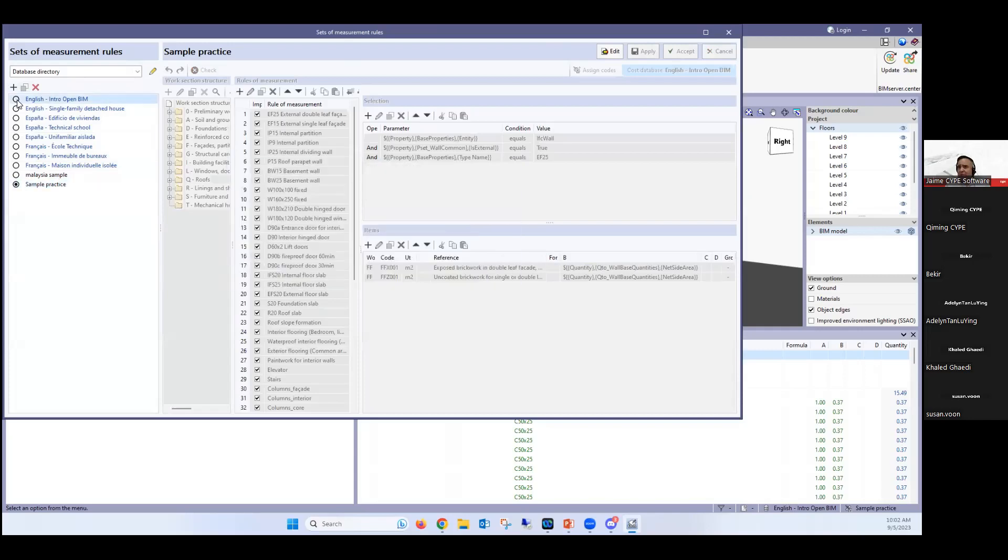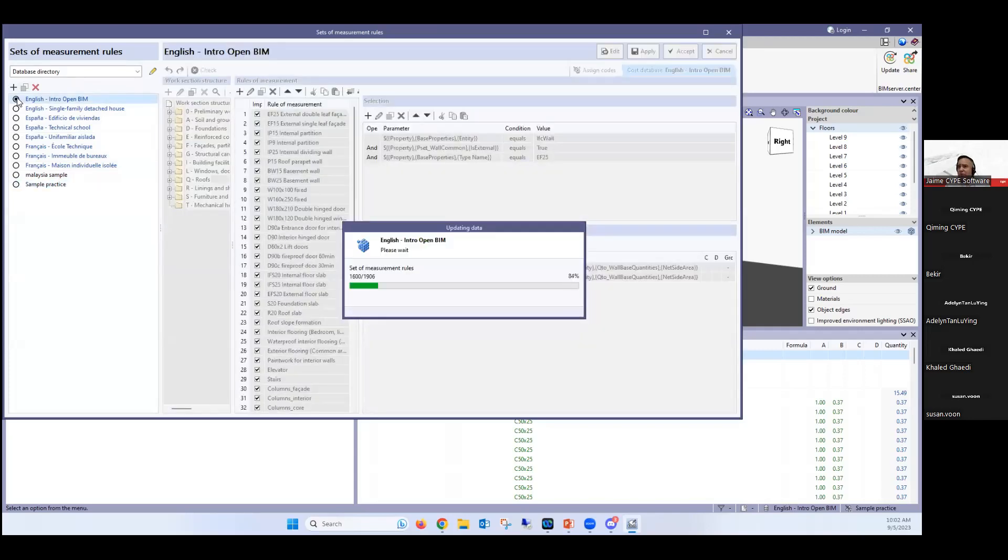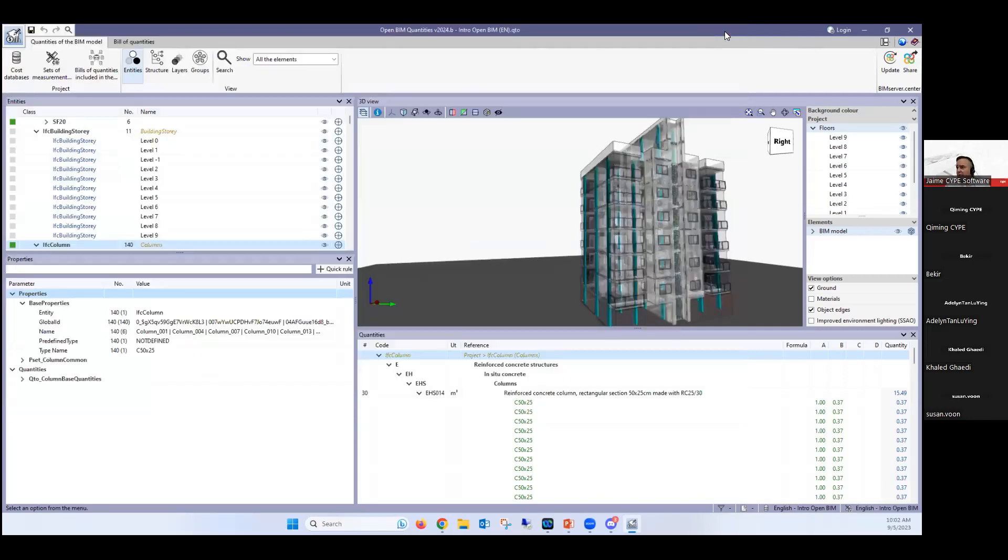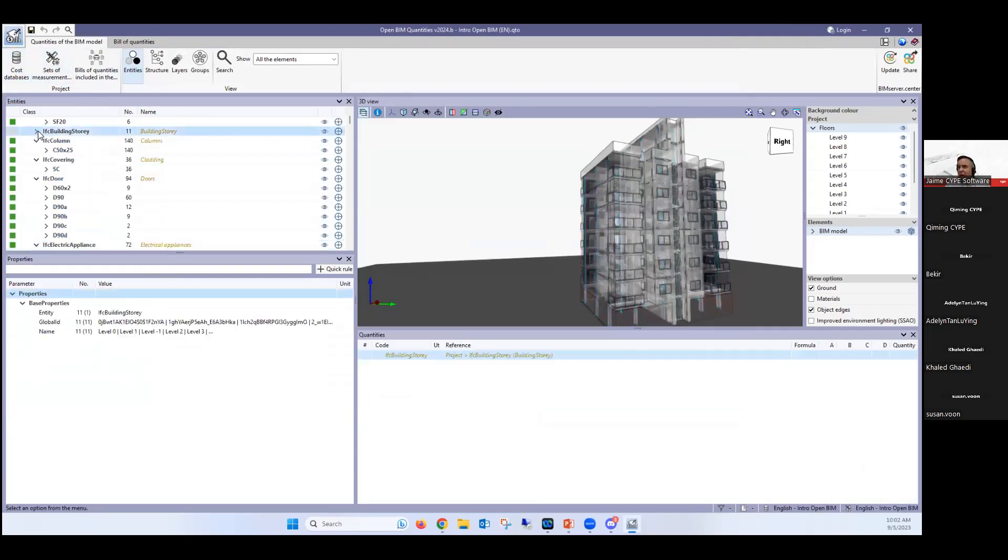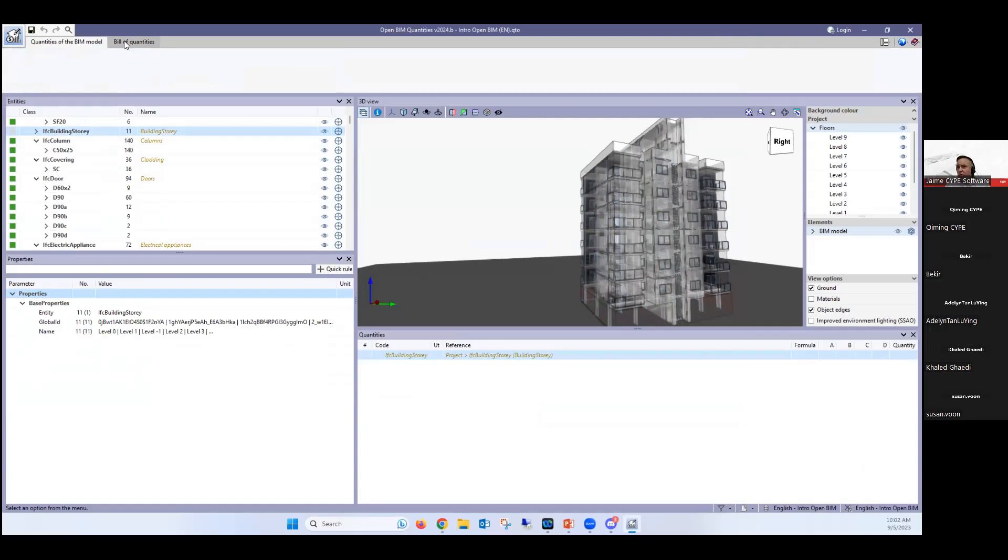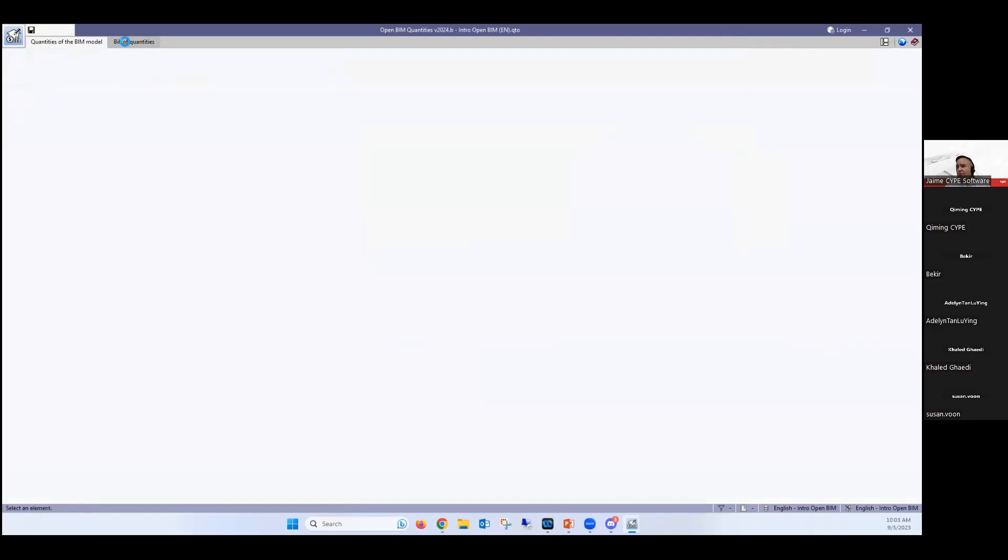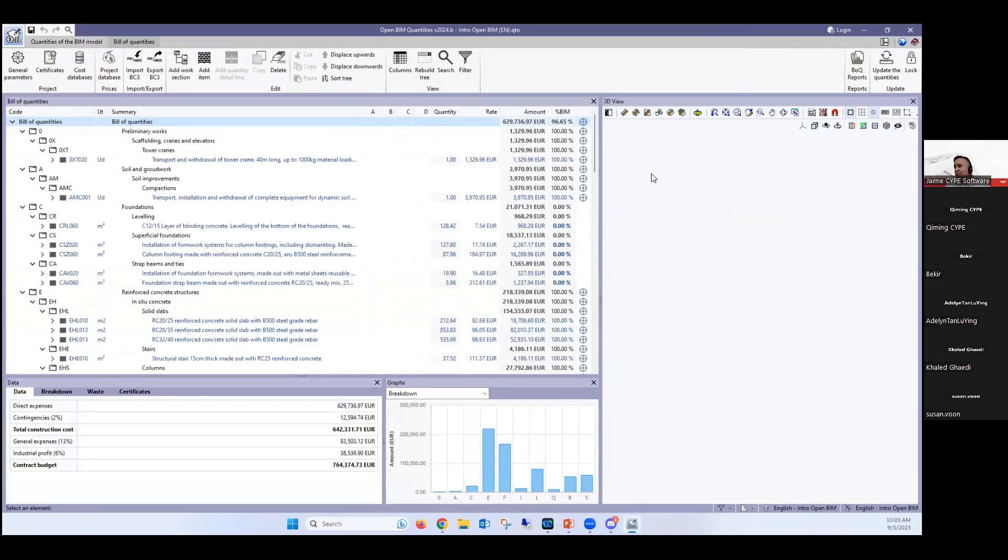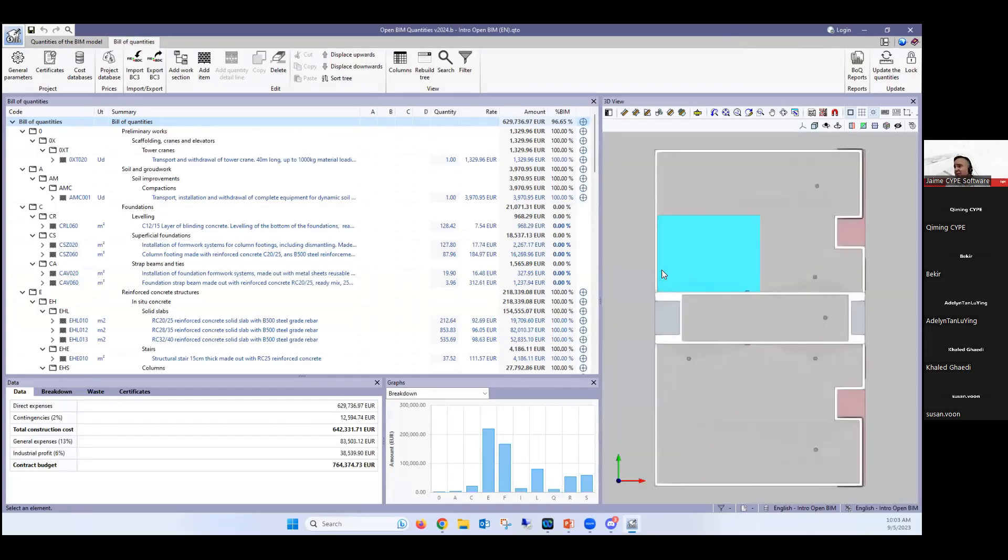Now, once you have the 3D model or the digital model, the cost database and the set of measurement rules, now we're able to generate a BOQ. And I'm also going to show you here in this next tab how you will work with this program if you don't have a digital model. Now, the most interesting way to work with this software is obviously with a digital model because it extracts the quantities automatically, but if not, it's also possible.